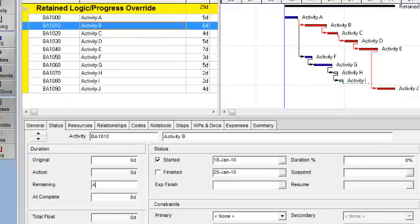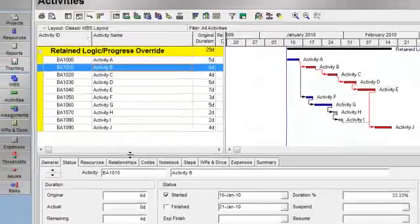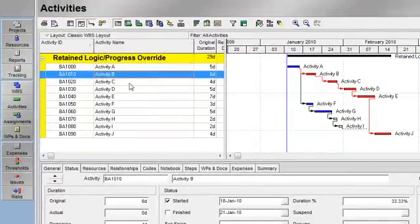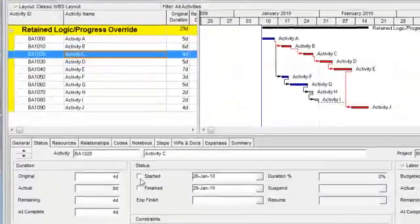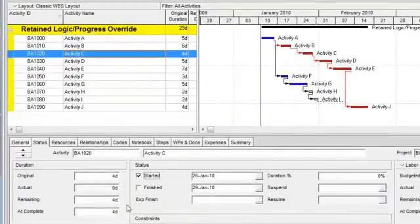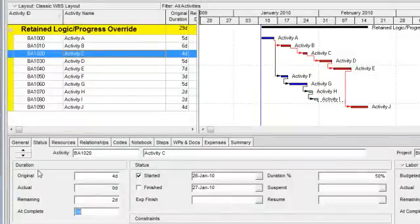I'm now going to status activity C out of sequence. So I'll say that it started and that we have two remaining days of duration. So once again, activity C, according to the network logic, should not have started since activity B has not been completed.